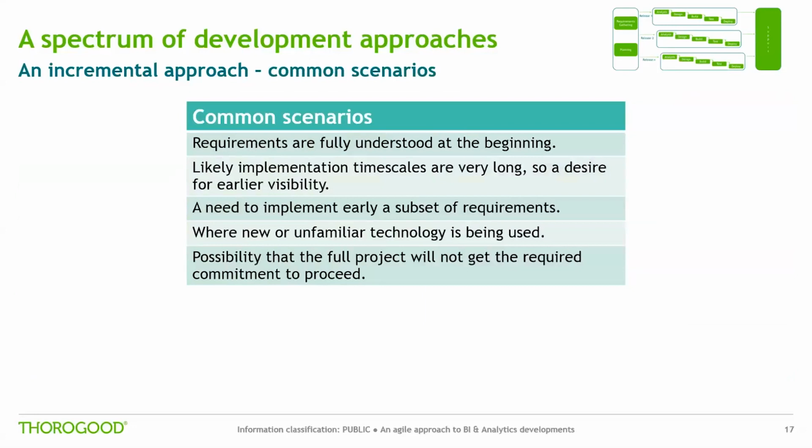Requirements are fully understood at the beginning, but there's a need to implement a subset of these requirements ahead of the full implementation being completed. For example, legal or market reasons, or maybe time-bound system replacement requirements.